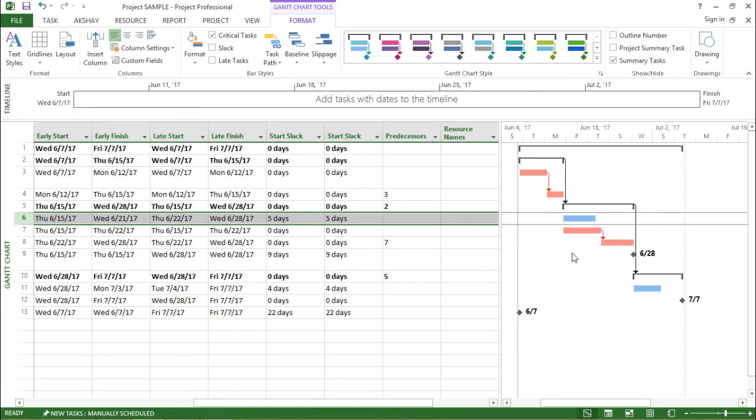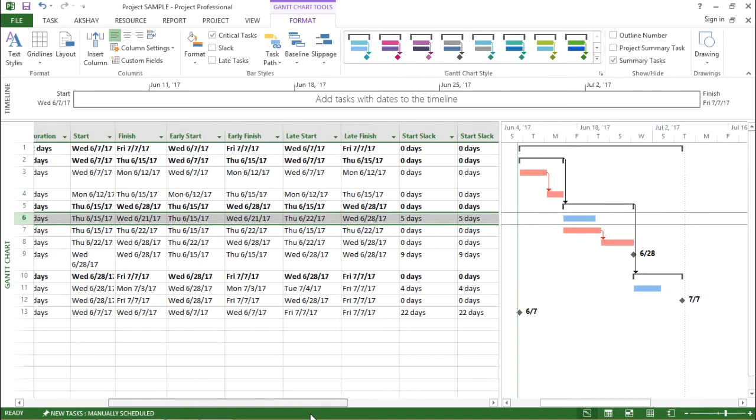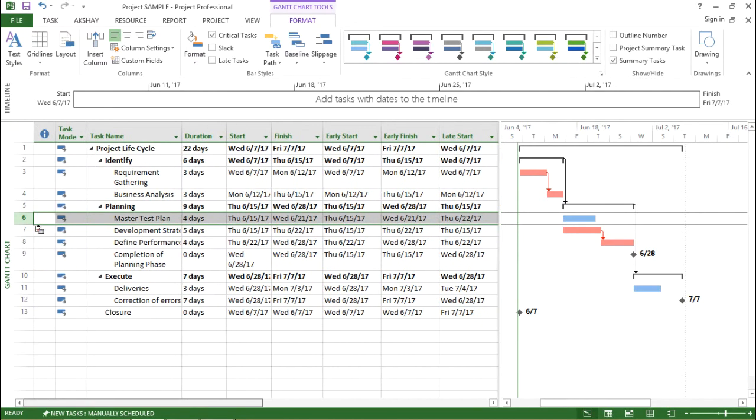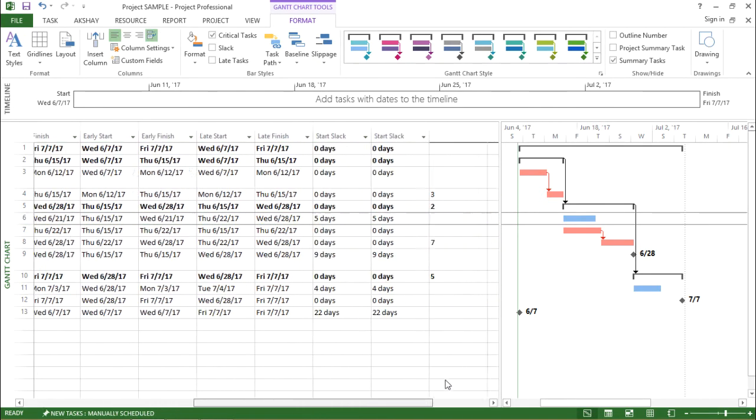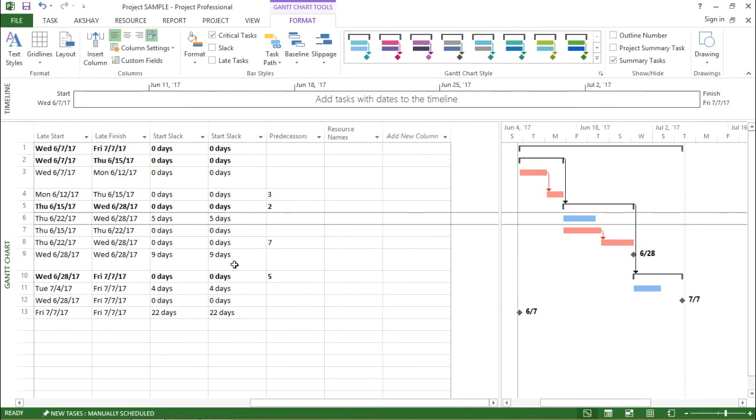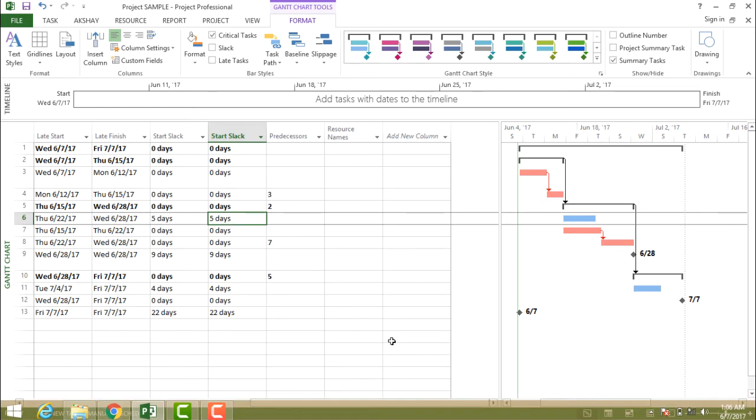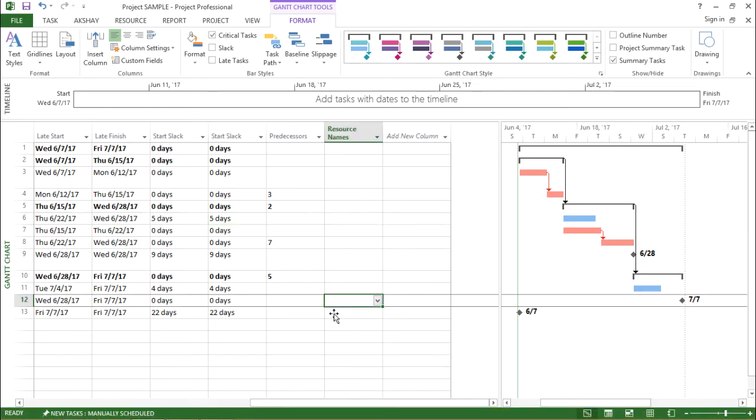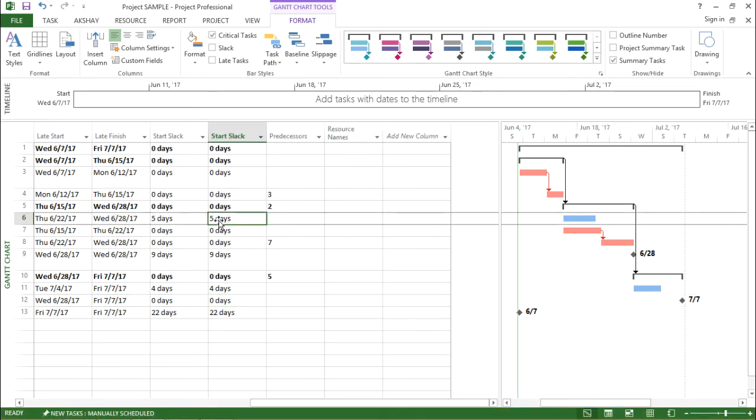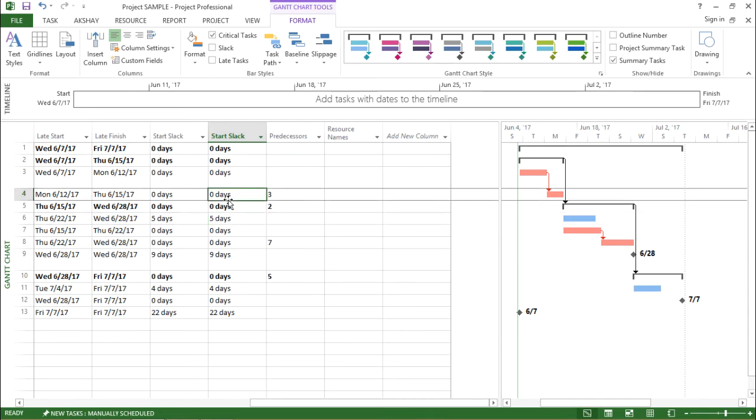that is the blue horizontal bar, which is not a critical task, it is a normal task. It is for Master Test Plan. If you see, the Start Slack for this is five days. So basically it gives me an idea that Start Slack for non-critical tasks will have a value, whereas Start Slack for critical tasks will be zero. So this was about Start Slack.